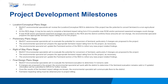If impacts to or conversion of farmland have not yet been evaluated at the time the district submits the RES for the final design plan stage, and new right-of-way and/or permanent easement acreages are available, the Environmental Specialist will determine if the project will convert farmland. If so, the appropriate farmland impact rating form will be prepared and submitted to NRCS. The Environmental Specialist will provide the district with any new project-related findings via the RES response and discuss appropriate actions with the project manager if necessary. If acreages are still not fully known, the Environmental Specialist will reassess impacts to farmland at the next RES stage.